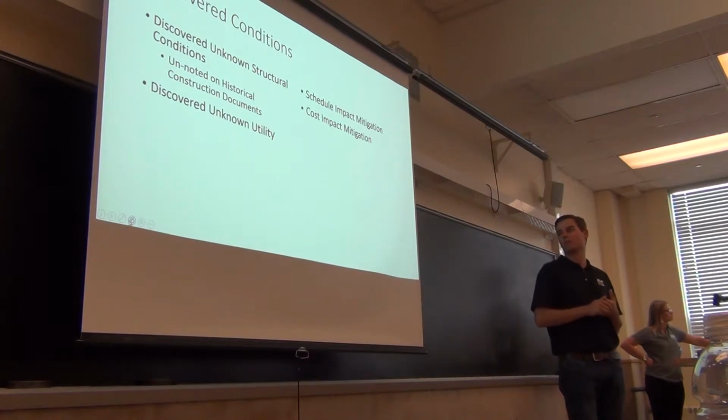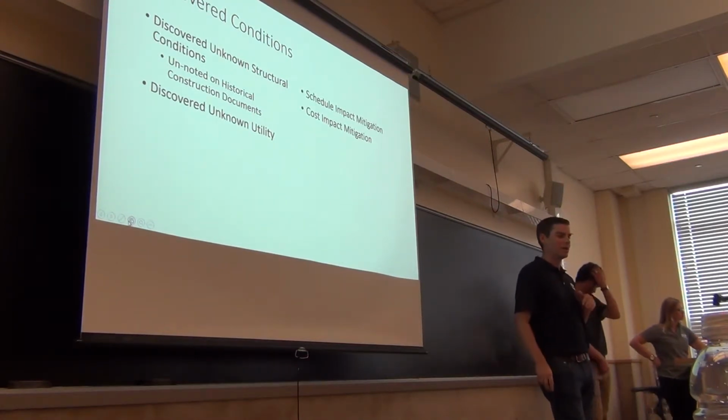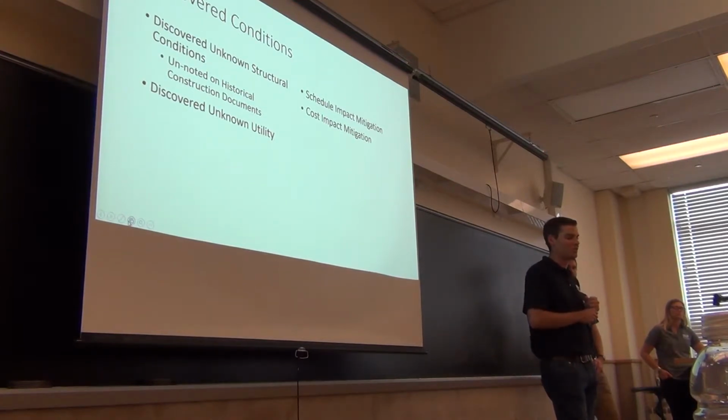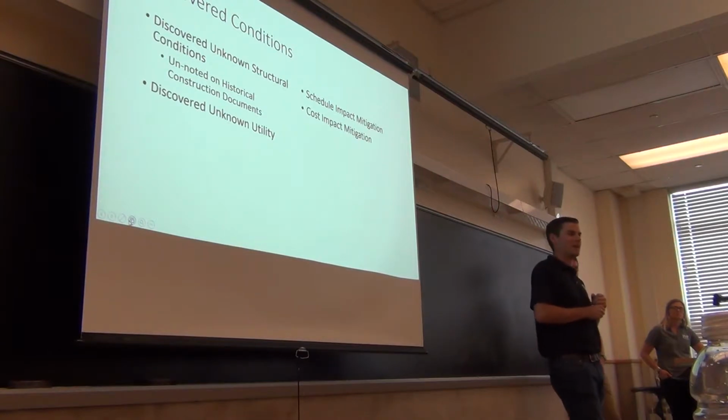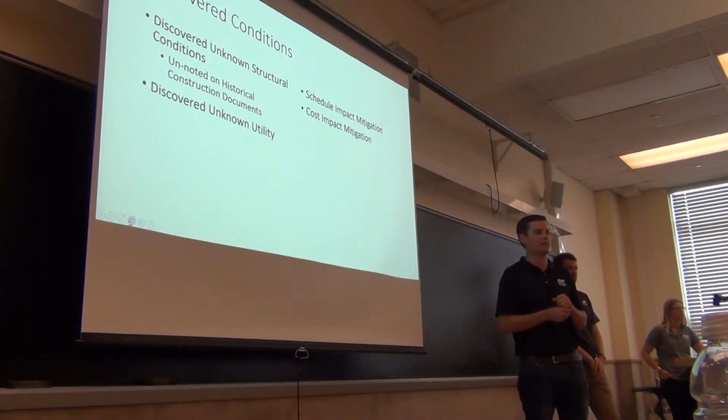Also, something we ran into was discovered unknown utility. That was every place where we put a bucket in the ground to excavate for these new foundations. We found stuff that was not where it was supposed to be, unlisted, unknown. I think that every single foundation on this job was redesigned around discovered utilities.